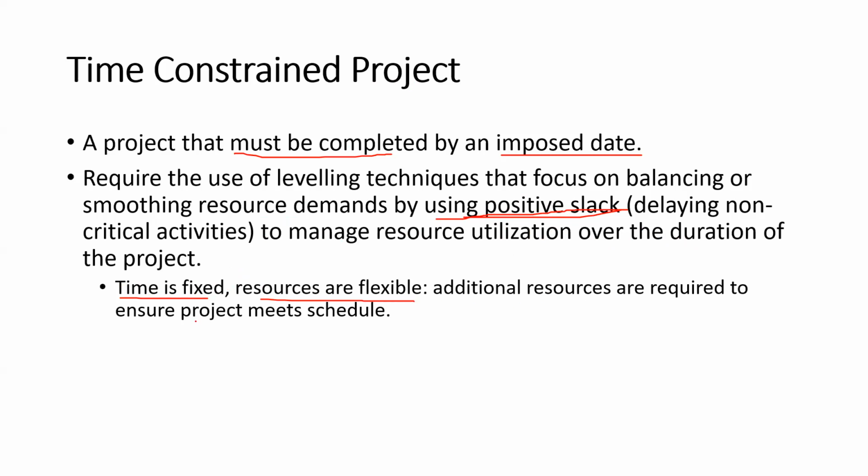Additional resources are required to ensure the project meets the schedule. In a time constraint project, we have to meet the imposed date, which means no extension is given for the time period. In that scenario, we have to use additional resources to meet our schedule.